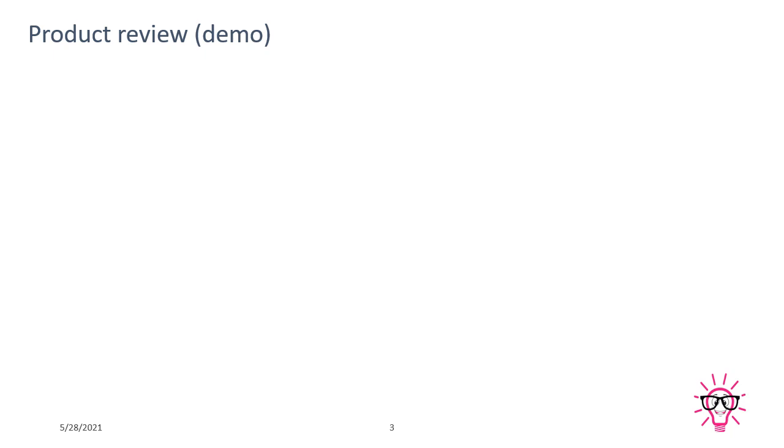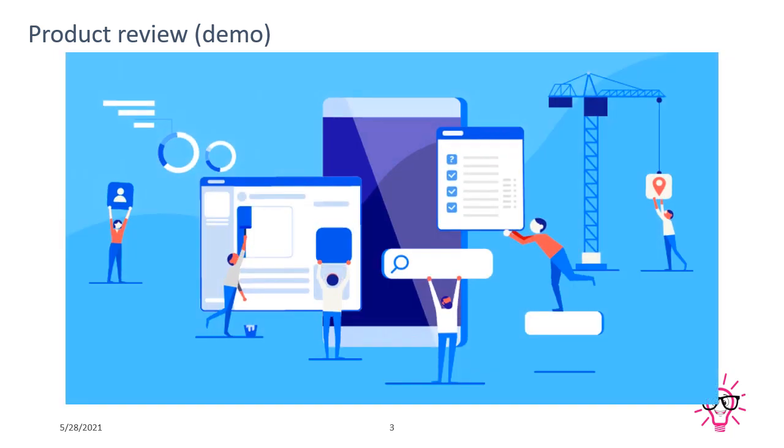So how will the product owner start? Maybe the product owner says like this: on the screen you will see what I thought would be our next 10 things to work on, but I want to insert XYZ and ABC that came up today. Here XYZ and ABC are requirements, and I'll add that probably as item 3. So you can provide some sort of number if there is any number available, or you can say that I'll add that probably as a demo item. So likewise you can do it.